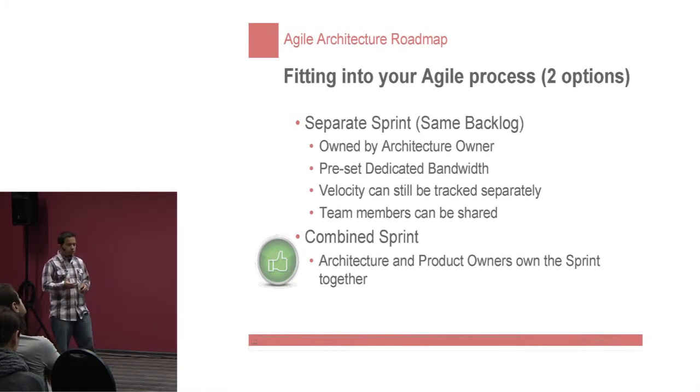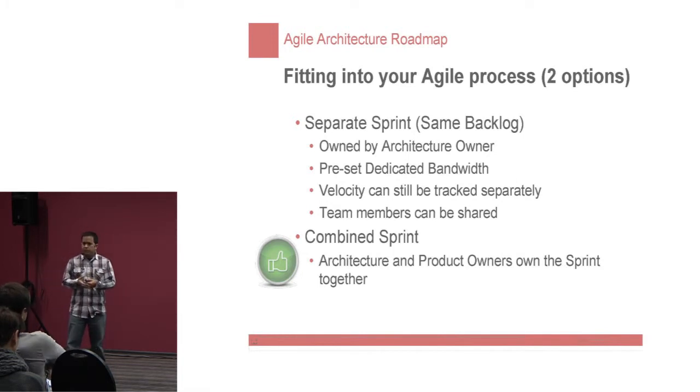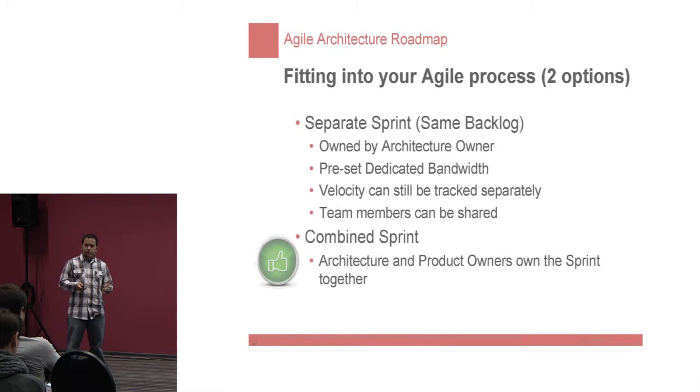There were a few problems with that. Whenever your team agrees to a number of points, a number of stories they're going to do, it's really difficult to commit to two different sprints. And then it becomes conflicting, because if one sprint's running behind, how do you still do work in the other sprint, those types of things.